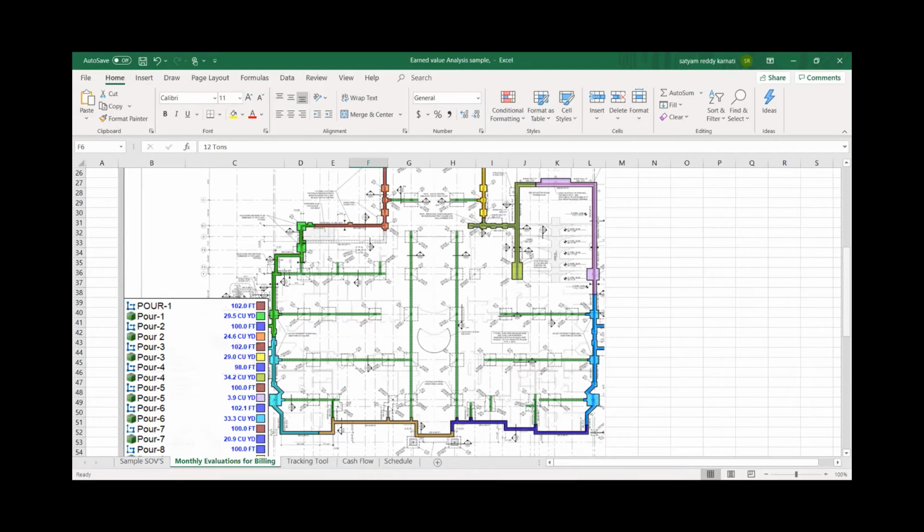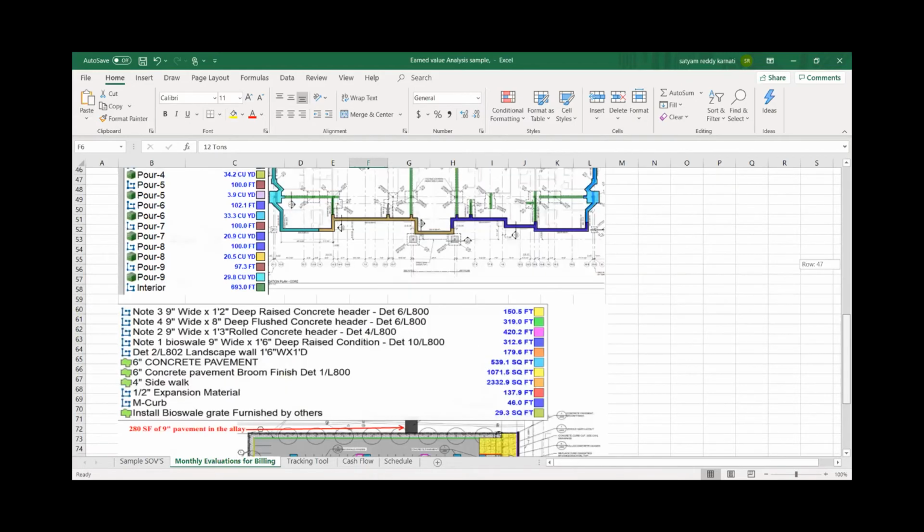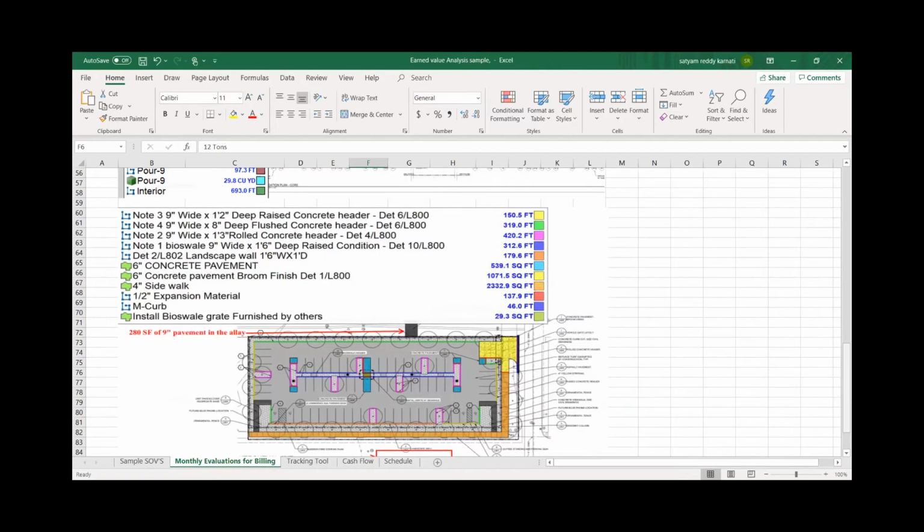This is what we furnish on this project. We eliminate the process of them figuring out where is this detail, where is this information. I highlight and give them an 11x17 or a bigger sheet, depending on the type of project, that they stick up in the job site, and they should be able to see their entire scope with the details, dimensions and lengths. So this eliminates changes or extra work.